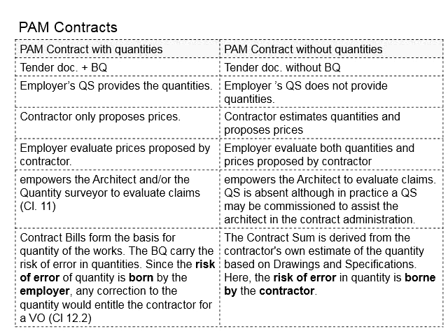However, in the case of the contractor severely underestimating the quantities, even though the project is awarded to the contractor, there is no guarantee that the work can be completed and effectively delivered to the employer. There is still possibility that, especially when the contractor severely underestimated the quantities, the price bid by the contractor appears to be lowest among the others. If the employer chooses to go for the price, there is still risk of not acquiring the building or infrastructure as required by the employer. Later, there will be a lot of contract administration problems between the employer and the contractor.